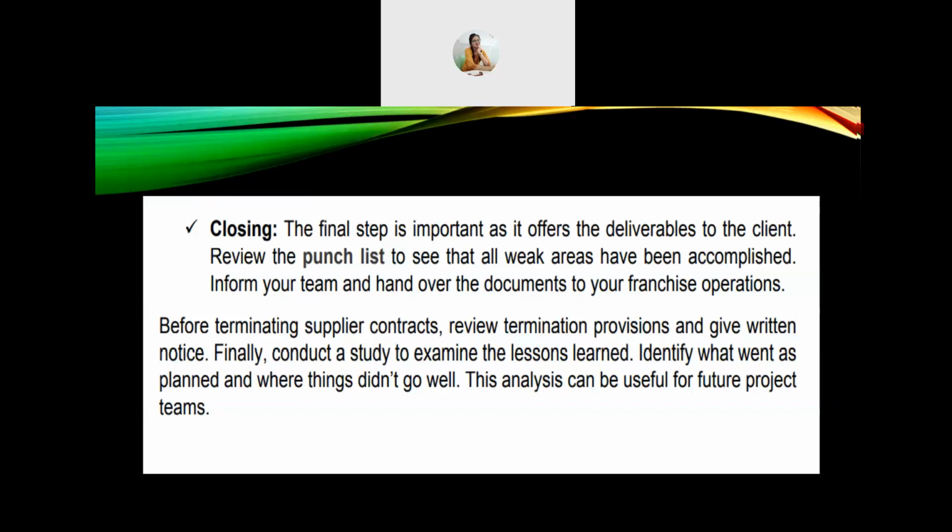Before terminating supplier contracts, review termination provisions and give written notice. Finally, you have to conduct a study to examine the lessons learned and identify what went as planned and where things didn't go well. So this analysis can be useful for future project teams.